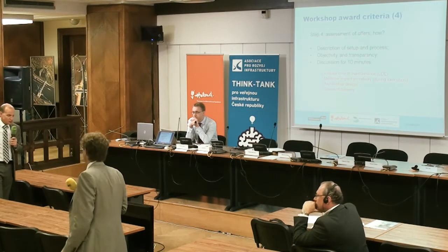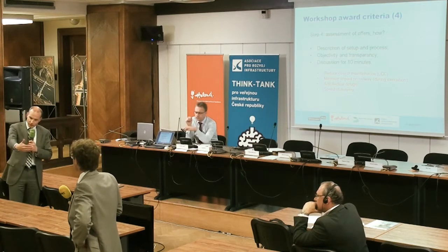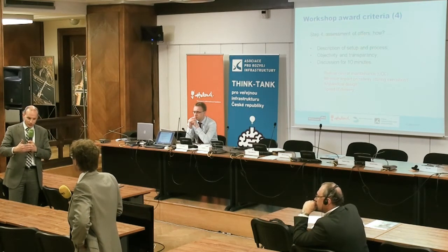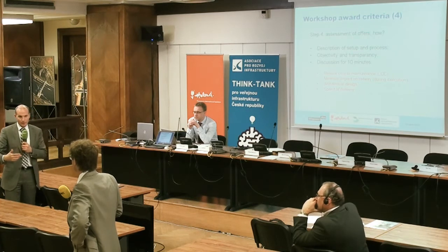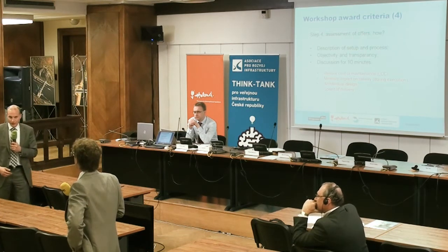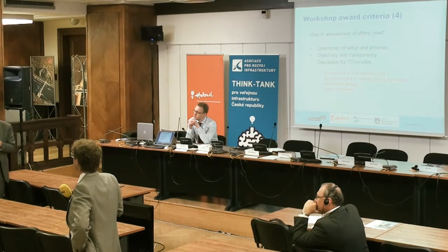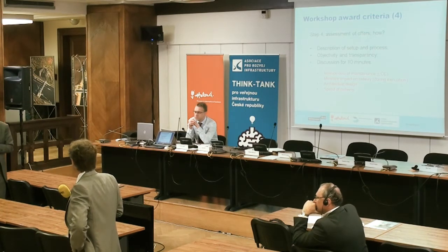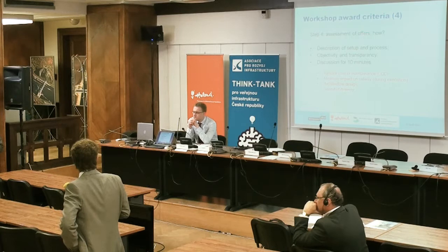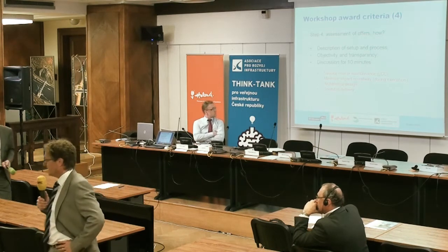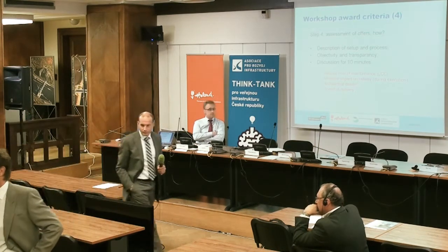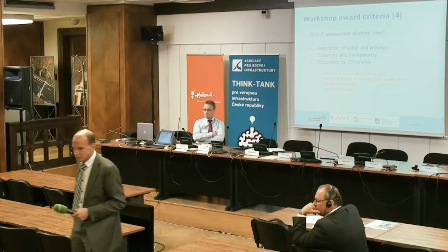There's another pitfall with the speed of delivery. That is when you give a maximum budget they can earn. What we have seen is sometimes that all the contractors go for the maximum score. So it's best to just leave it open and let yourselves be surprised, even though it might end up in a very high score. Okay, let's look at the impact on the railway during execution. How are we going to measure this? Anyone who has been creative on this one?